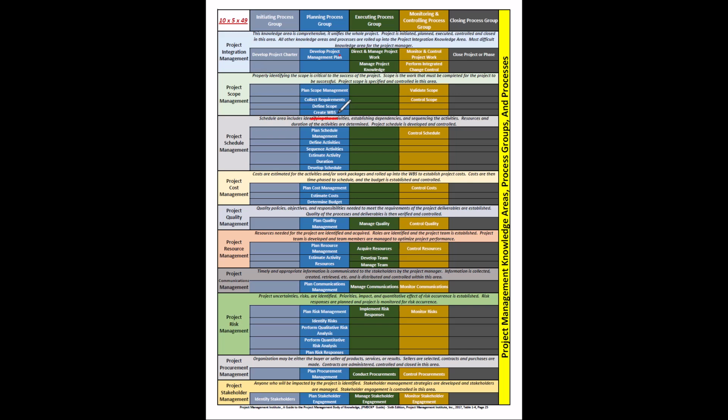It should have the name of the person assigned to do the work or the group, a detailed description of the work for that work package. It may have activities in it and other supporting information such as perhaps agreements if you're outsourcing parts of it, things like that, maybe some technical data. Whatever's necessary would also be a part of that WBS dictionary. So it does contain all the details for the work package itself.